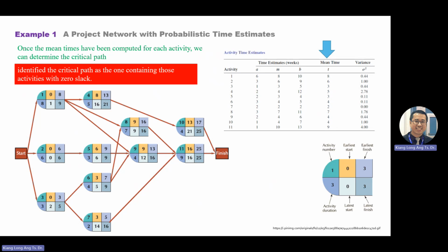For example, this one, the one that I mentioned on the whiteboard. You see how you choose the 25? Here, when you do the forward pass, you see your earliest finish, this box, 17 and 25. When you do the backward pass, choose the maximum number. When you pass back, do not write 17 here. This will be a careless mistake. So choose the maximum number from the back.